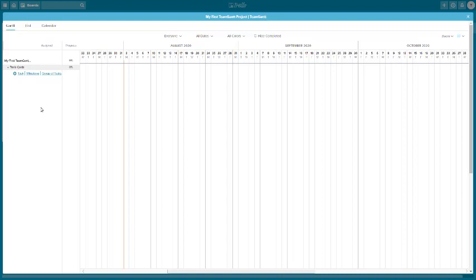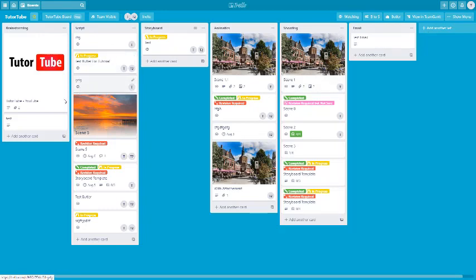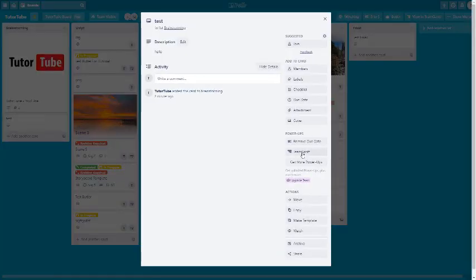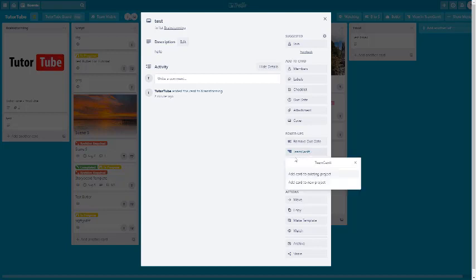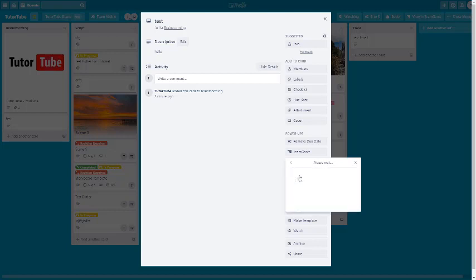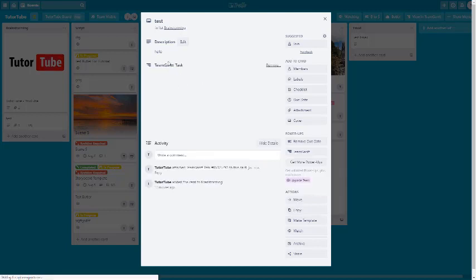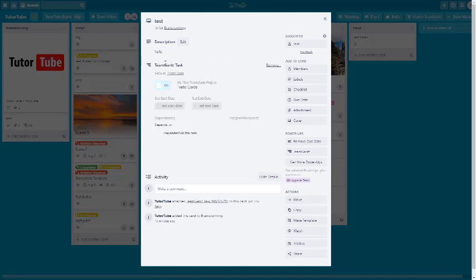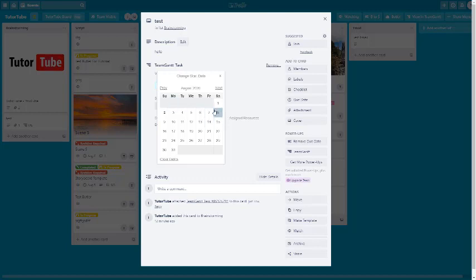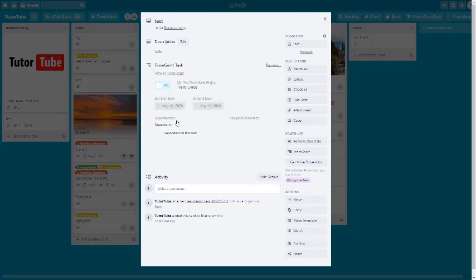You have to add individual cards to the Gantt chart first. Click on a card to open it, and you can add it to TeamGantt. It will ask if you want to add the card to an existing project or a new one — add it to an existing project, like 'My First TeamGantt.' Then you can set a start date, say August 10, and an end date of August 12. You can also mark it complete. Now this card is assigned to the Gantt chart.